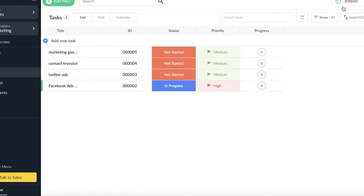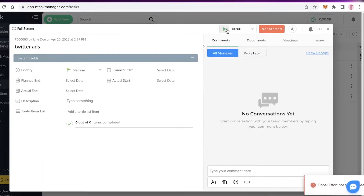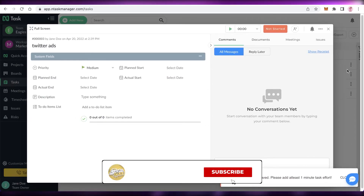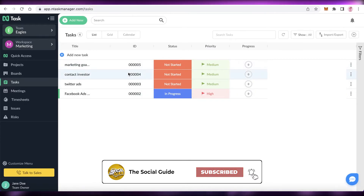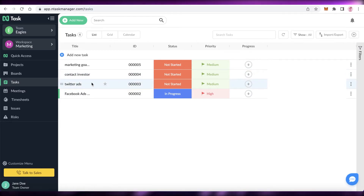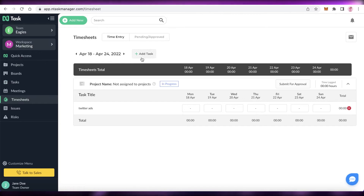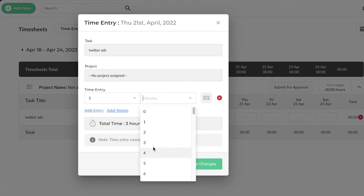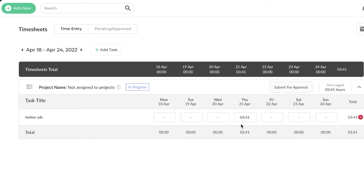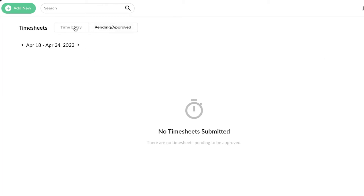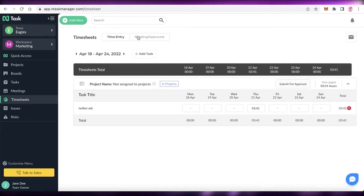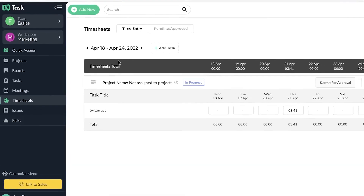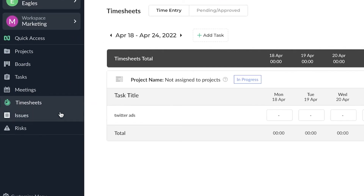Once you click on a task — say, 'Twitter Ads' — you can turn on the timer, go do your work, and stop it when finished. If it's less than a minute it won't be recorded, but any real work session will be. You can also manually add time — for example, 3 hours and 41 minutes — and click 'Add Time.' That entry appears in your timesheets. You also have a pending and approval section where employees submit timesheets and managers can review and approve them.